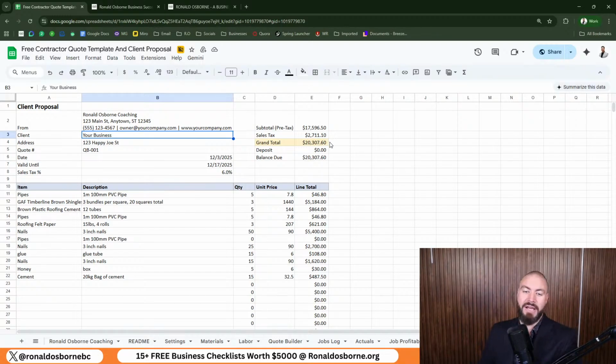You'd actually be amazed how many contractors I work with that go, okay, this is how much it's going to cost me at the 25 rate, it's going to cost me this much money, I'm just going to say to the client, extra 20% on top, 25, 30% on top. It hurts you in the long run. It doesn't actually help you. So it's just something to be aware of. I would not recommend that at all. Stay right away from doing that when you're quoting your jobs. You've got your sales tax and everything on here.